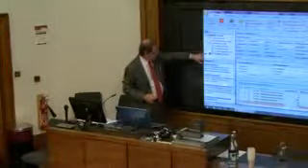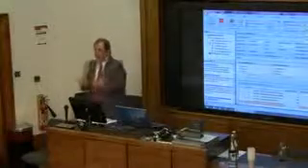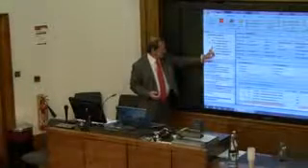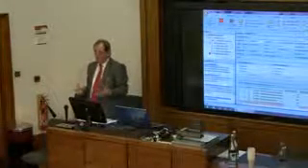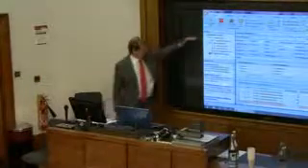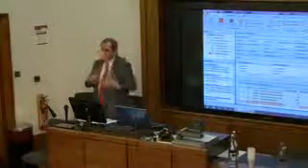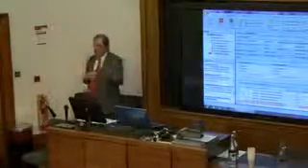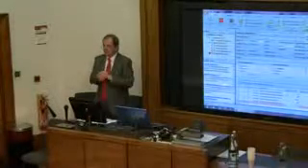Here I've mixed and matched Primavera with MSP, but you can mix and match, and I could have a snapshot or a progress update in a different planning tool, or I could have 4 projects that I wanted to compare. It's how you want to work. If you're doing a tender, or you've got 4 submissions, you could suck in all their 4 plans, even in different formats, and actually compare their plans. Which ones are good on logic? Which ones are good on resource? Which ones are good here? Okay, is that all right?